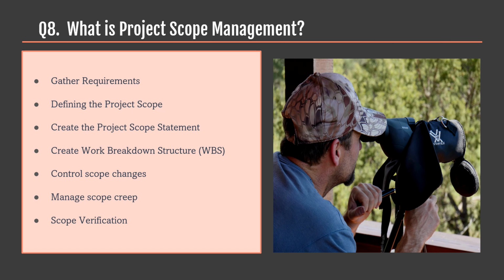Project managers should be vigilant about scope creep, which refers to the uncontrolled expansion of the project scope beyond the initial boundaries. To avoid scope creep, any proposed changes outside the agreed upon scope should be evaluated thoroughly and addressed through the change control process. Once the project got completed, Mary got involved in reviewing the deliverables against the original project scope statement to ensure that all the requirements were met.